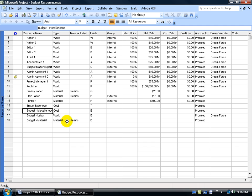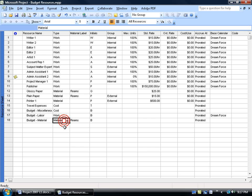Each one of these is going to be different in how it tracks. For example, cost is going to be in currency, work is going to be in hours, and materials is going to be in units. How much am I budgeting aside for all my cost resources, which is just the one — the travel expense — and it's going to be in currency. Let's say it's $2,000.